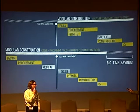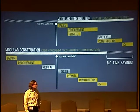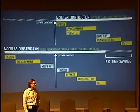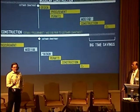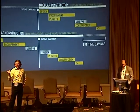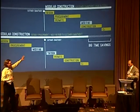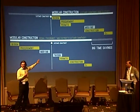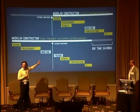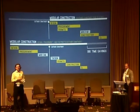But Steve, if you were to go out and buy, say, 10 megawatts worth of capital equipment for data centers, what would that spend be? We're probably in the 20s to 30 millions of pre-committed equipment purchases up front, prior to either internally committing as our own customer when we speculatively build, or waiting for the customer to come. So there's a massive commitment there.